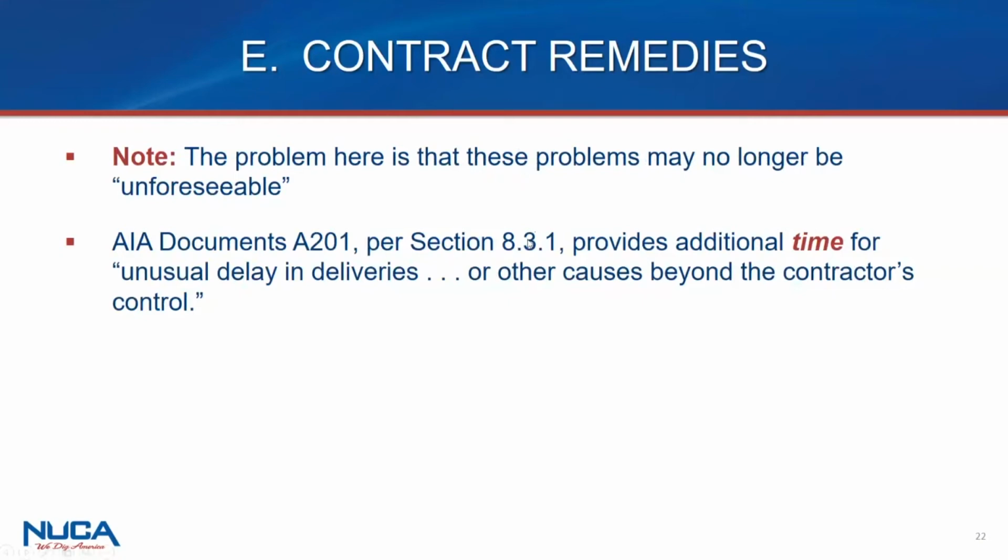Well, I'll say also, I had another project where the contract did not include an obligation for the owner to pay for it, but we arranged a meeting with the owner and explained, when the contractor's having problems getting it. Hey, look, as of right now, I'm not going to be able to get it until many, many months downstream, except that if we paid more for it, I could get it now.